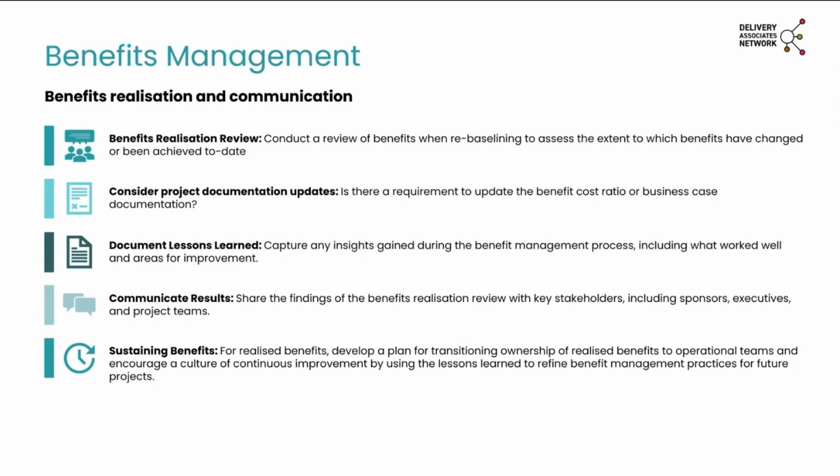So when you are rebaselining your benefits, look at your benefits realisation to consider any benefits that might have actually been achieved to date, and make sure that you are logging and communicating those benefits that have been achieved. But actually, there may be a knock-on impact to the value of benefits, but also the time horizon of benefits as well. So make sure you capture that within your benefits tracking.